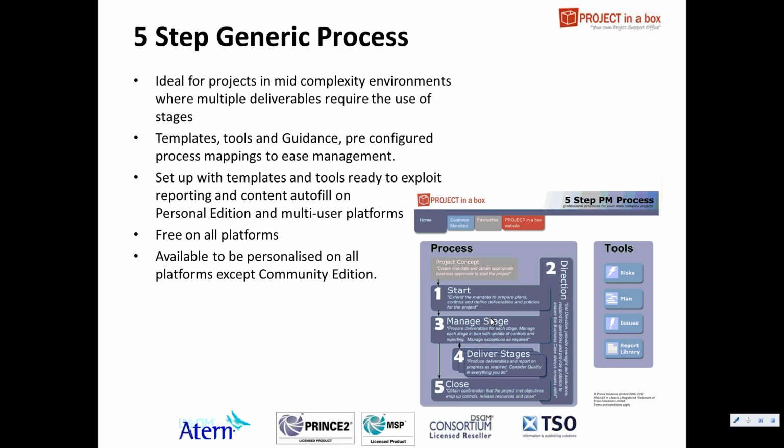Five-step is another one of our long-term generic methods, a very popular approach for more substantial projects. It builds on the three-step with a stages element, which includes stage plans and work packages, product descriptions, etc. So you can break down the complexity of your project into manageable elements, and it includes a direction process as well. Again, templates are provided, integrated into the task, risk and issue side of things for the project management.